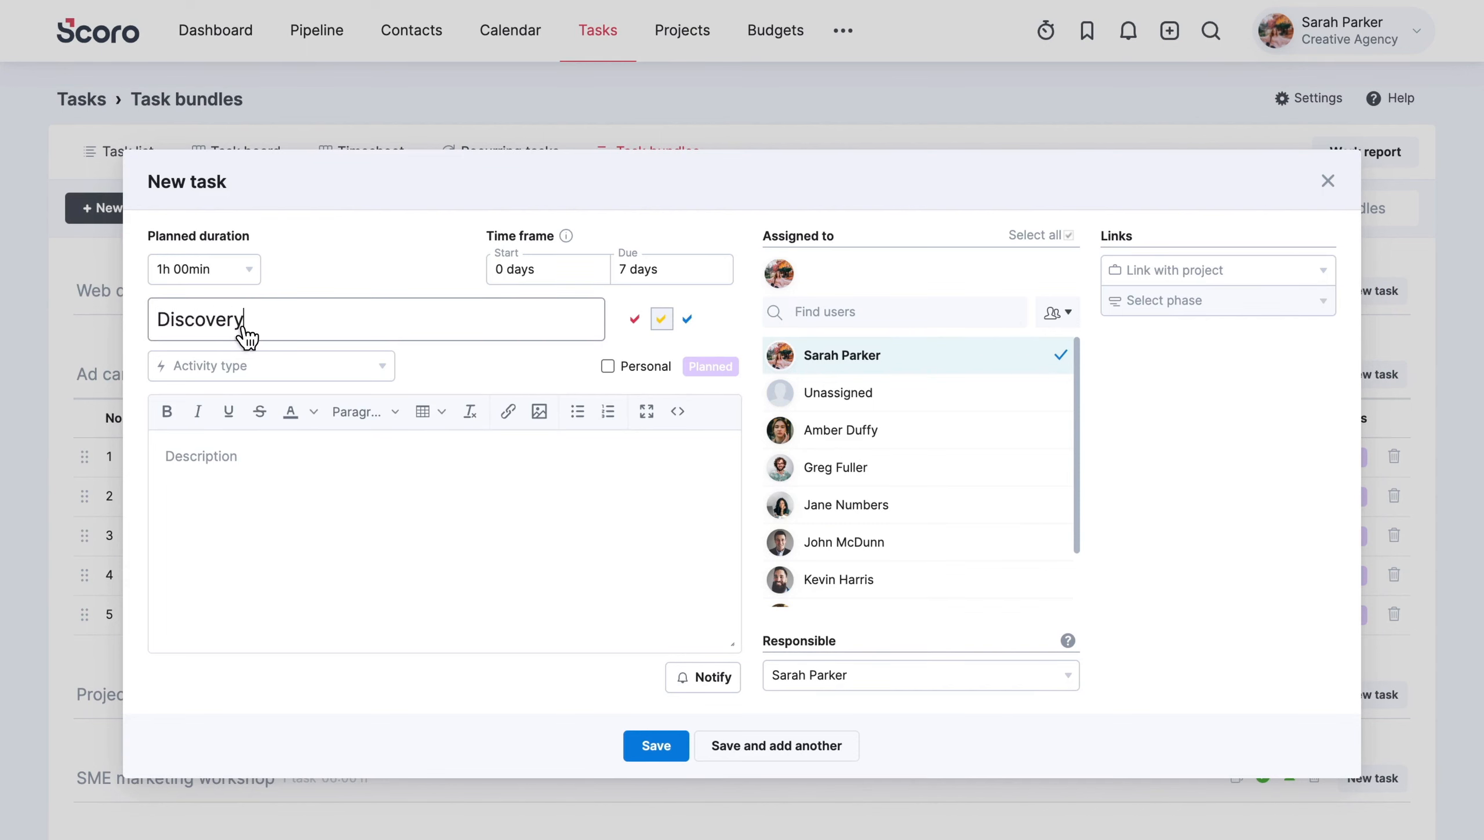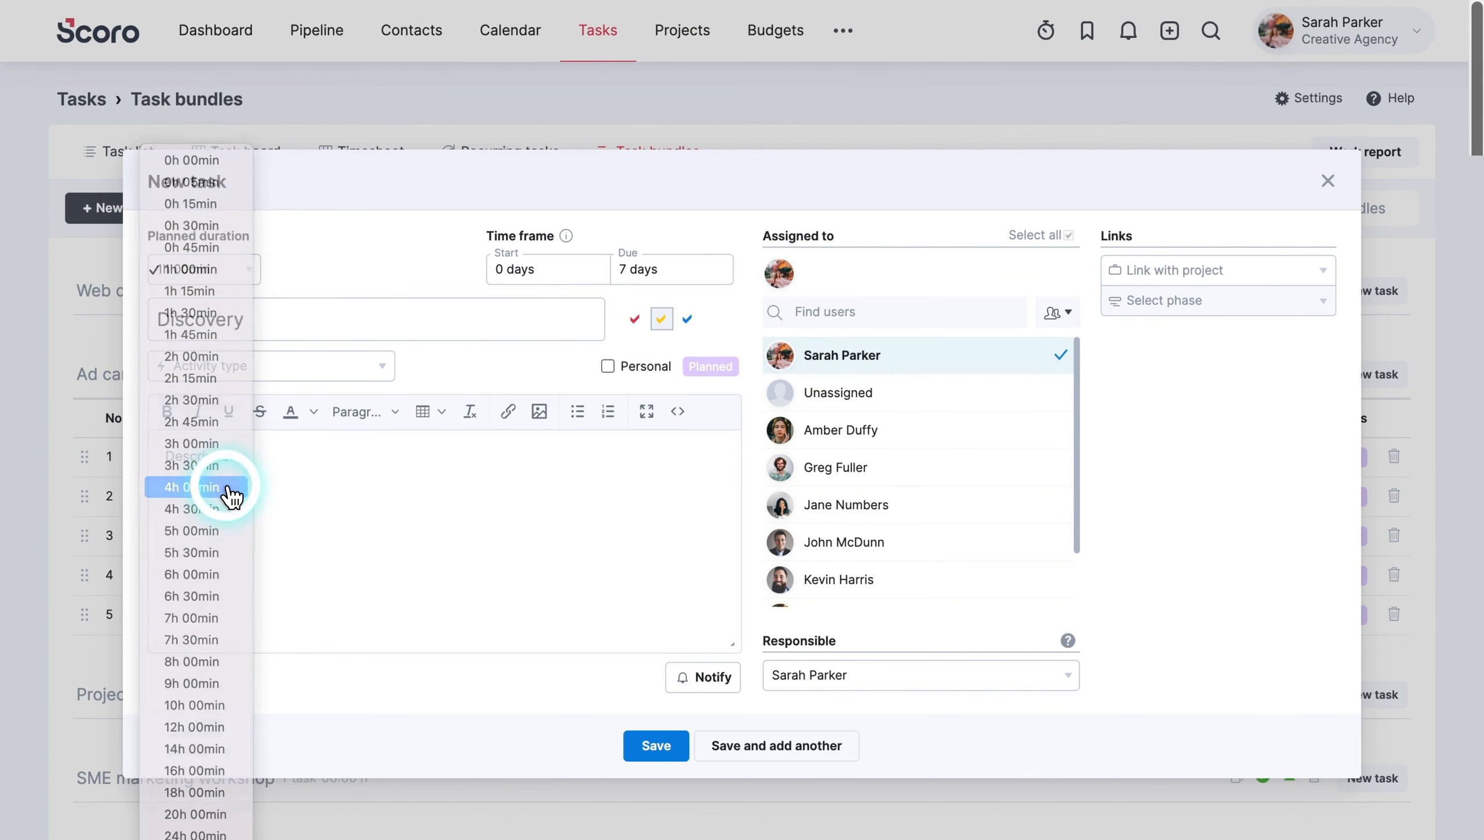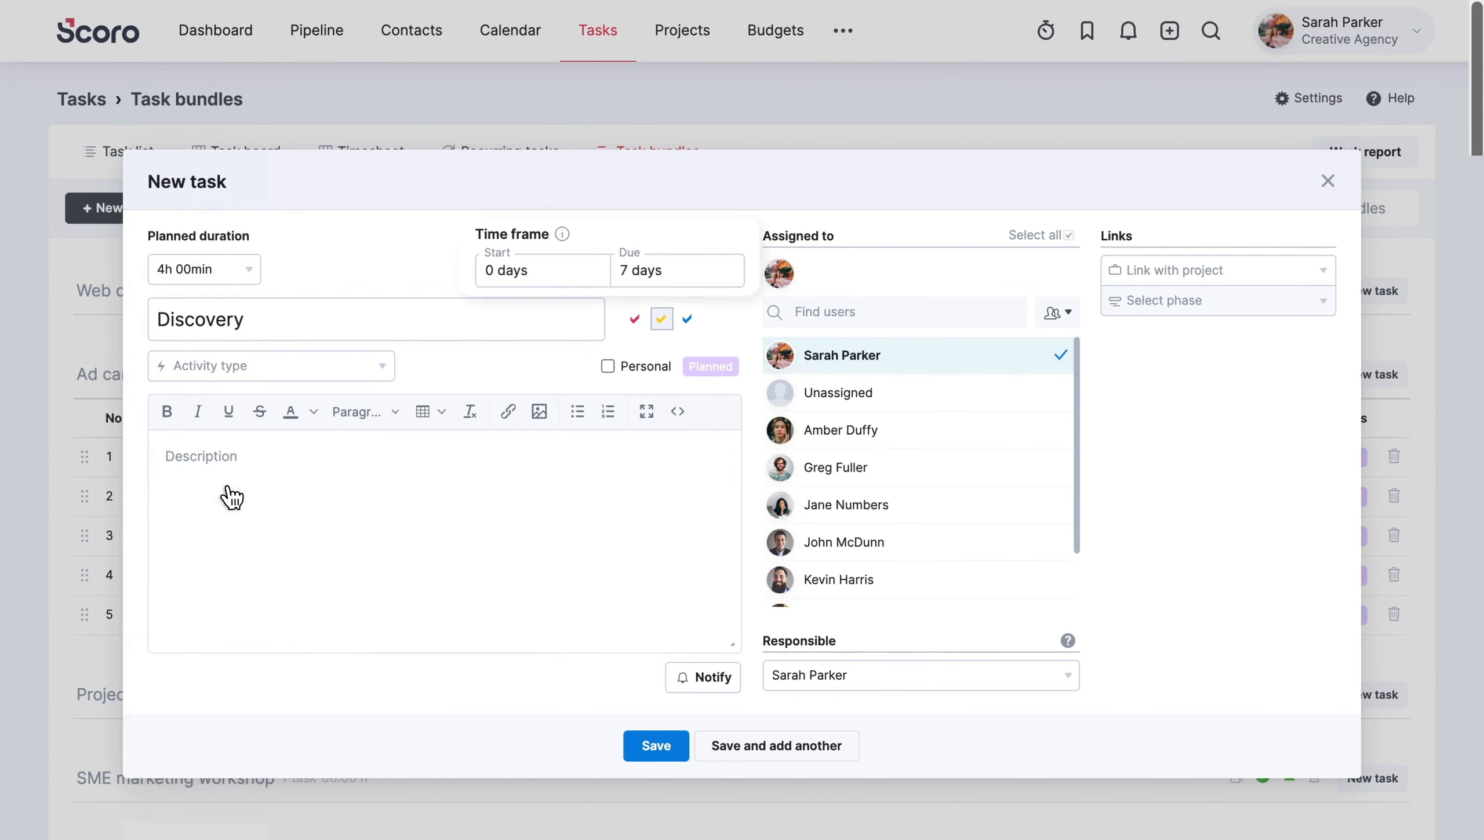Set the expected duration for each task and select the delivery timeframe. If the same employee always delivers a specific activity, assign the task in this step.